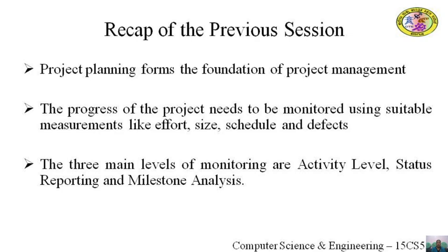This requires the project manager to understand the reasons for the variation and to take necessary corrective and preventive actions. Milestone analysis may also report the defects found by different quality control tasks and the number of defects that have been fixed.